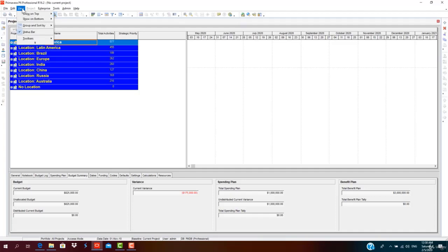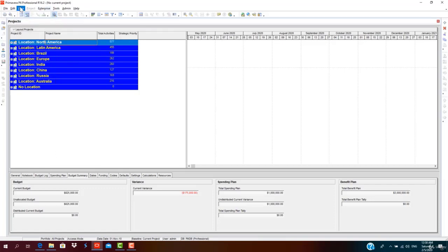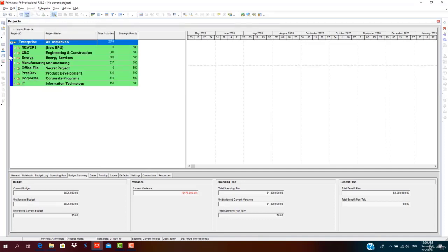In menu bar, click on View, go to Group and Sort by. It's currently in the location format. Go to Group and Sort by. Click on EPS. The layout changes into EPS. Before creating a project, we must create a new EPS.